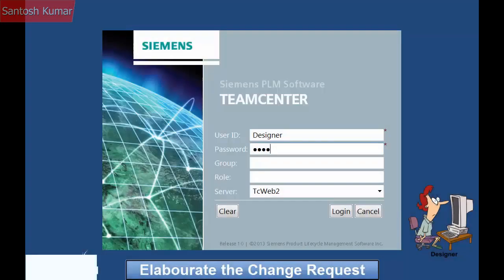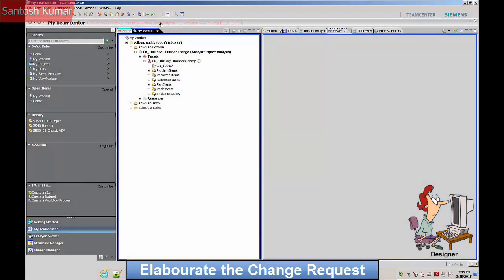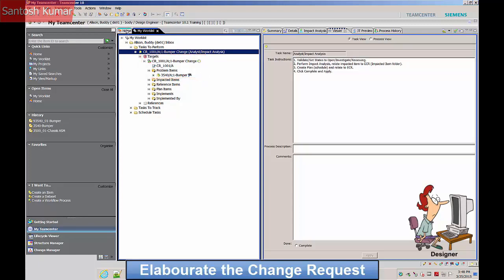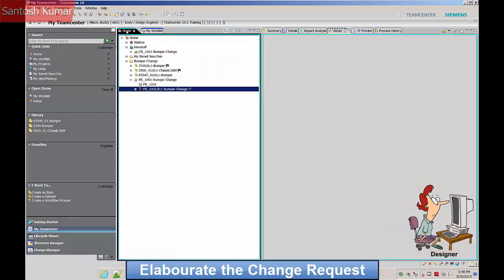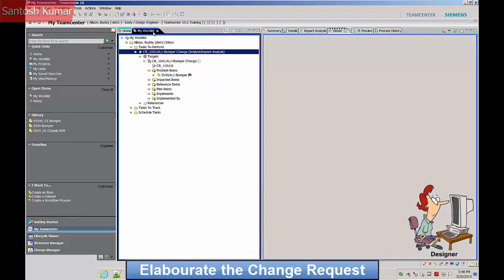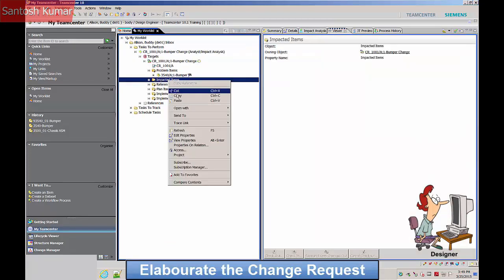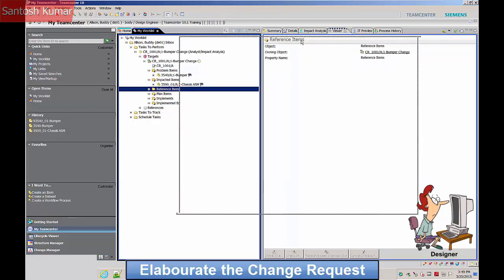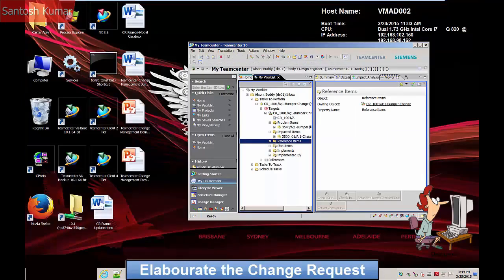The change request workflow sends a task to the designer to elaborate the change request. As the change request has been derived from the problem report, the original bumper appears in the problem items folder. This change will impact the chassis assembly containing the bumper, so it is added to the impacted items folder.